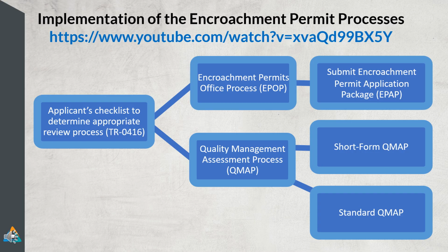The most important thing to remember is Caltrans does not administer those projects. Therefore, the Caltrans project manager is not in charge. Our job is to be there helping local agencies. Most likely the local agency has a project manager, sometimes a consultant, in charge of the project. So let them do their job.